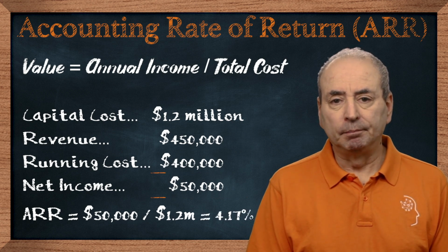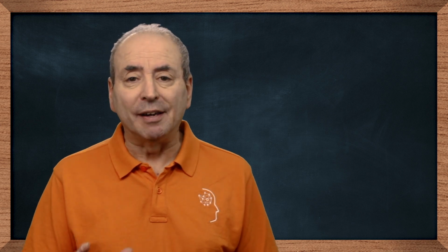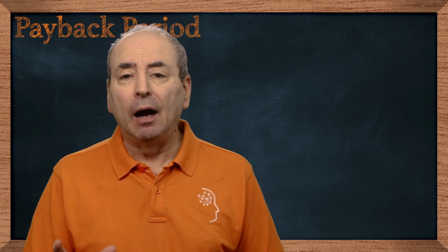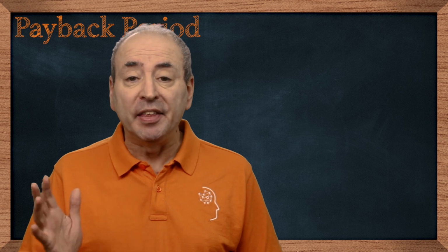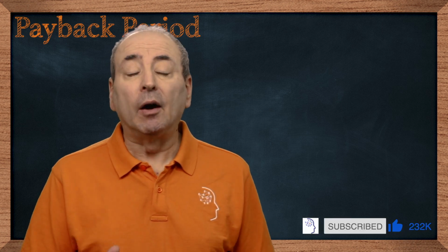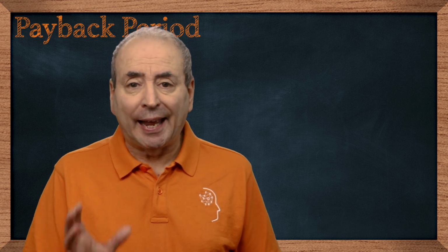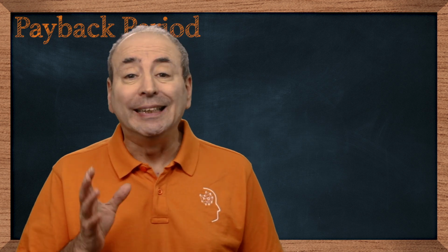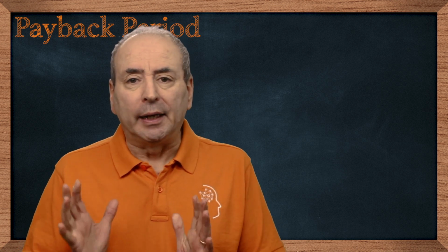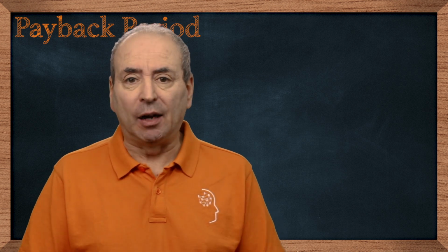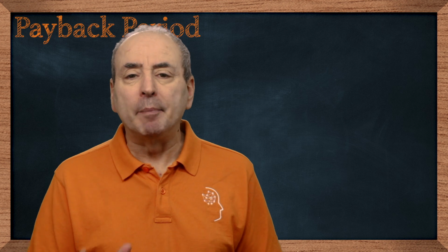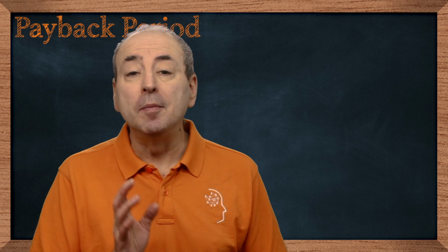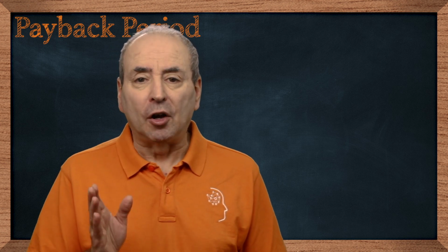A simpler approach to calculating project value than any of these is to calculate the payback period, how long it takes the project to pay back the initial investment. We can calculate a simple payback, which takes the cash values of the money the project generates and the investment cost, or a discounted payback, where we calculate the payback period using the discounted amounts. The payback period measures the amount of time it takes to recoup our investment, and for the accumulated benefits to exceed the costs we've incurred.